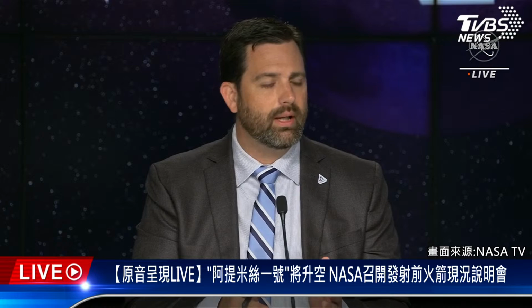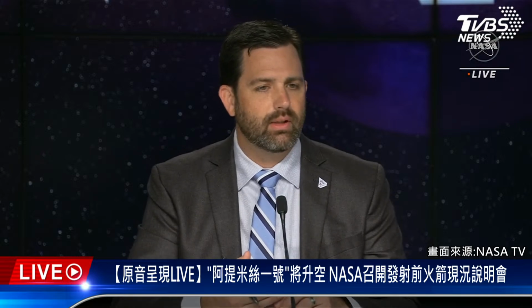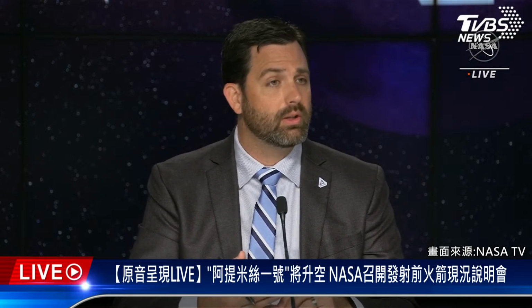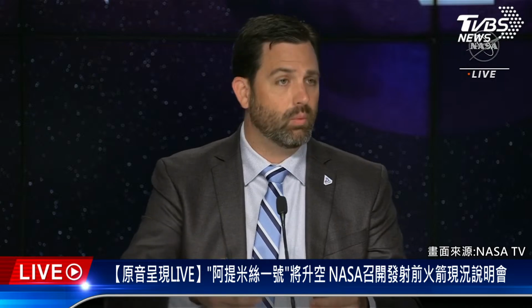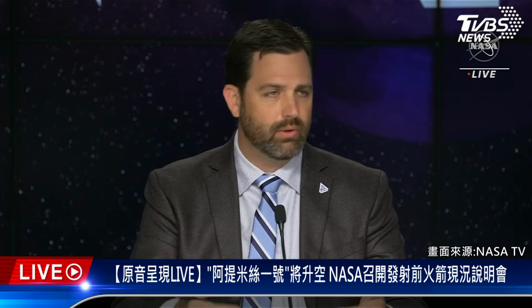On that one, it really will depend on when we choose to reset the clock. What happens right now is the GLS integration console, our ground launch sequencer, has a series of times of when those cutouts are. If we run into any issues, we'll perform an analysis and say we are good to launch at X time, and they'll reset to that, and then they avoid the COLA. So it's not completely automated, but we do have folks that have those times up, and it's really when we go about resyncing the clock to a new T0 time.